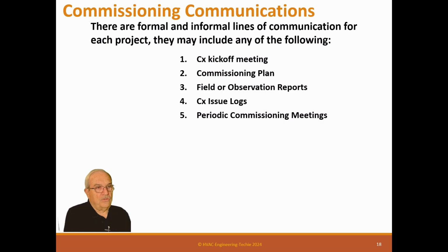Now, one resolution can be the owner said, okay, don't worry about that. That cost too much money. We're not going to do that. He just resolved it. I mean, he's the guy who's got the authority to do that. So your commissioning meetings, we'll go over that, is a way of communicating. CX workshops, if you have a big problem you need to work out, have a workshop that works well.